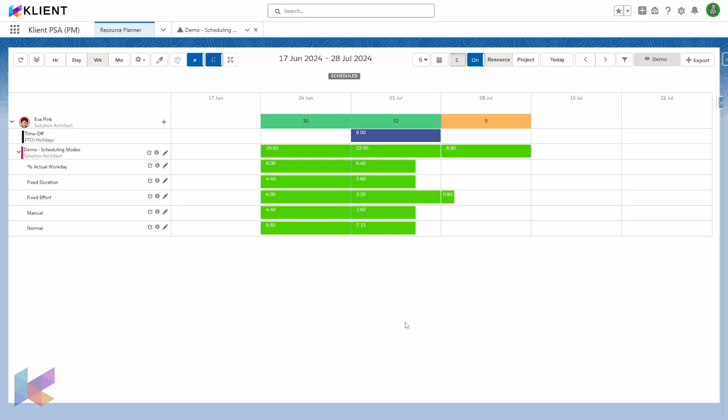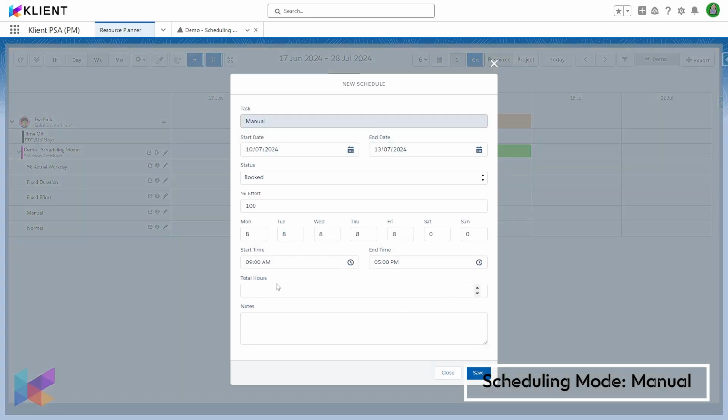And then the last one, the manual. In this case, we're disconnecting the resource plan from the project plan, so that if you're changing dates on your project plan, it is not going to recalculate the assignments. So if you're in the mode where you're a bit more granular, assigning resources by the day, or you want to do very precise planning on the resource planner, you don't want that to be recalculated whenever you change dates. Manual will be your mode here.